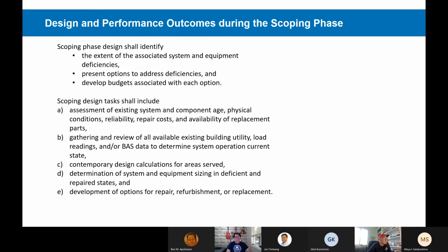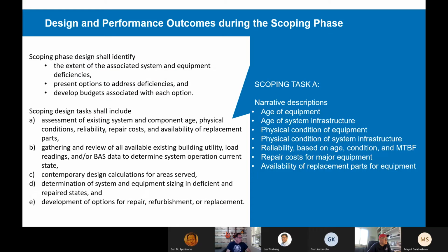This is the same language from that scope section. It's just blown up so that you can read it, and we'll start walking through it in the next couple of slides. So task A is assessments. This is a pretty traditional piece of scope. You review the equipment data, do a field walk, and then write up assessments of it. All those items listed in this bullet point list should be included in that write-up.